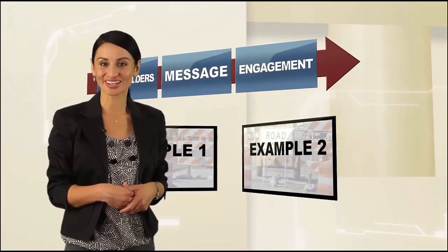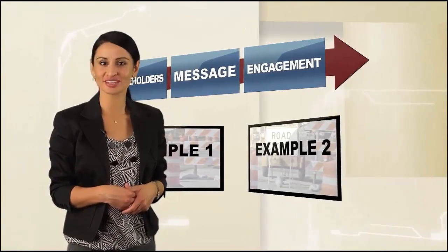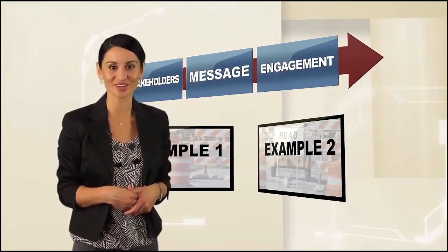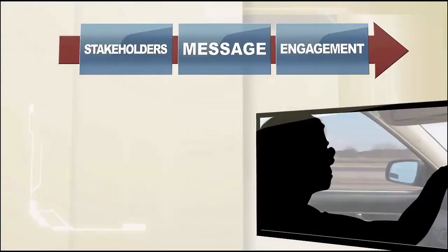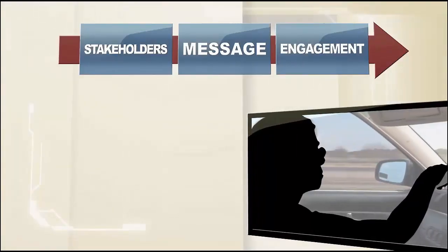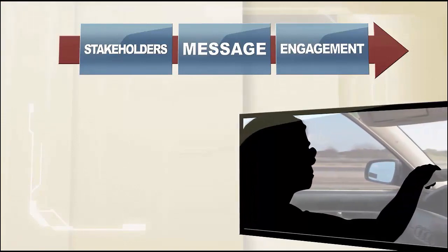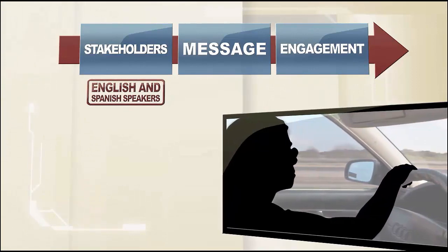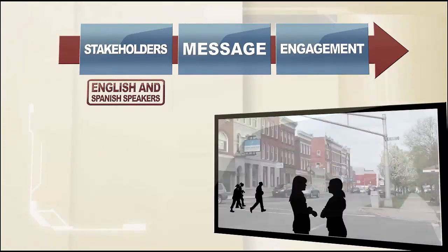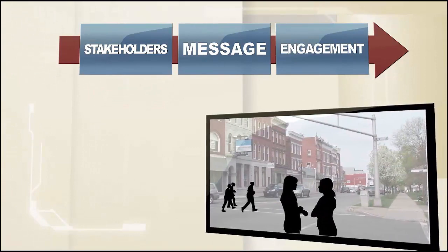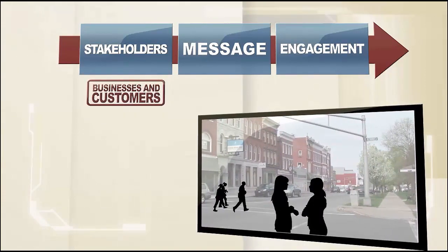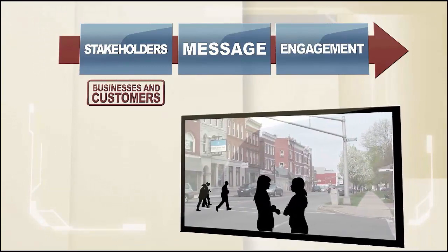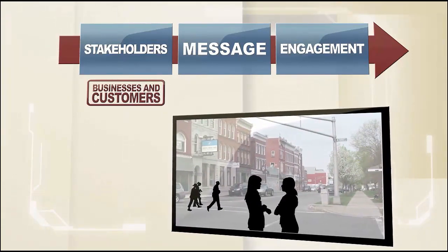Our second project starts off looking very much the same as the first, with members of the team driving through the district and talking to stakeholders. But because the area businesses and customers are predominantly Hispanic, the team also includes a Spanish-speaking colleague. They observe a lot of vehicle traffic and pedestrians on the street. Discussions with the business owners and their customers reveal that pedestrian access is vital to most businesses, and public parking is vital for a few.